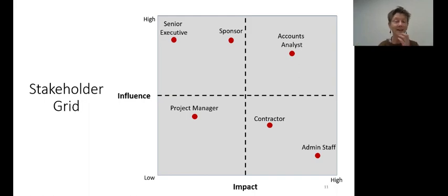So this is Ruth's Arbitrary, my contract management system. I'm implementing this. And so I've laid out some stakeholders and where I think they might land on my stakeholder grid. Senior executives have lots of influence because they could pull the plug, they could escalate, accelerate the timeline. I'm not really changing their life though. I have a project manager person that's overseeing this particular project.